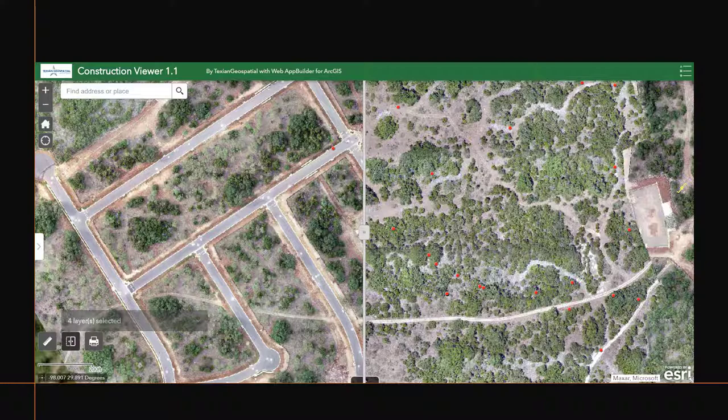So before we even do a tree survey or on the ground topo, we use this mosaic information to actually look at how we want to lay out the next section of 100 lots or 200 lots based on trees that we can see from our own images, and based on the topography that we can determine from these images as well. So we use the mosaics to help with planning and to also see progress on one big picture and being able to move around on that one big picture.